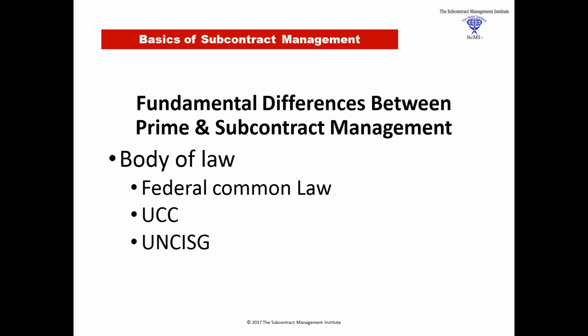So when you enter into a government prime contract, you have to follow those rules. What's included in those rules? Well, when does a contract become a contract? In the federal government arena, it is not a contract until the contracting officer, and that's a properly warranted contracting officer with full authority for the scope of the contract, the price or type or whatever, signs the contract. That's when the contract comes into being.